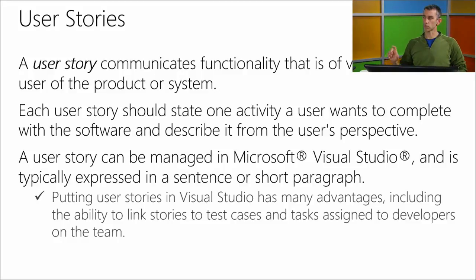You can get those user stories right into Visual Studio. You can have your test tasks associated right to those user stories, and your test cases are associated to your tasks. So everything is traceable back both directions, so you can see how your user story is being tested, and you can validate if a user story even changes down the road.